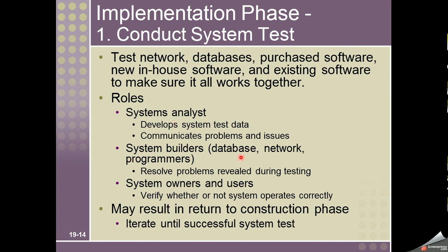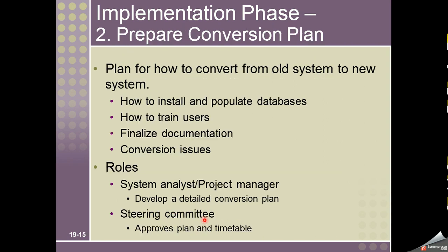The system builders, database, network and programmers will resolve these problems. The owners and users will verify whether or not the system operates correctly, and it may result in a return to the construction phase or even the design phase. We will keep repeating this till the system has passed all the tests.